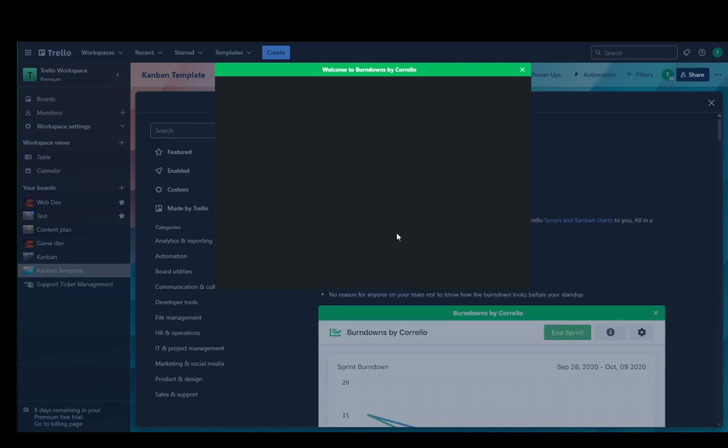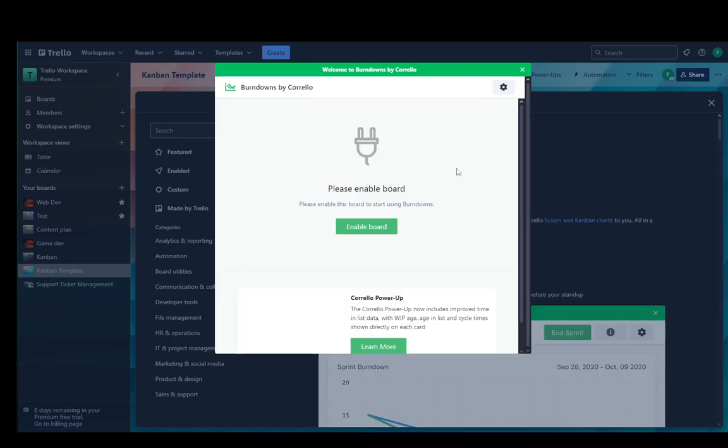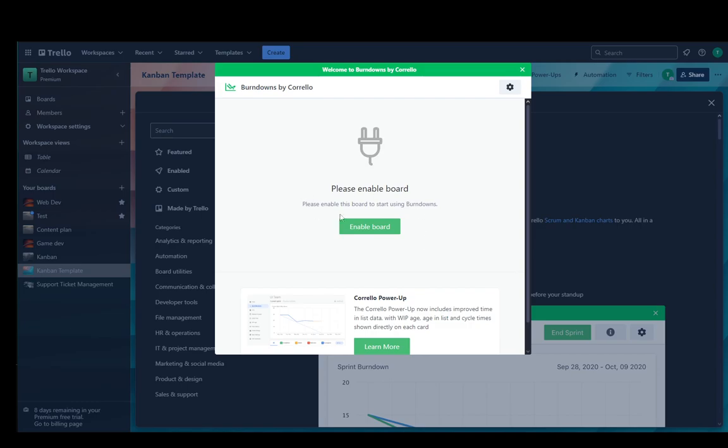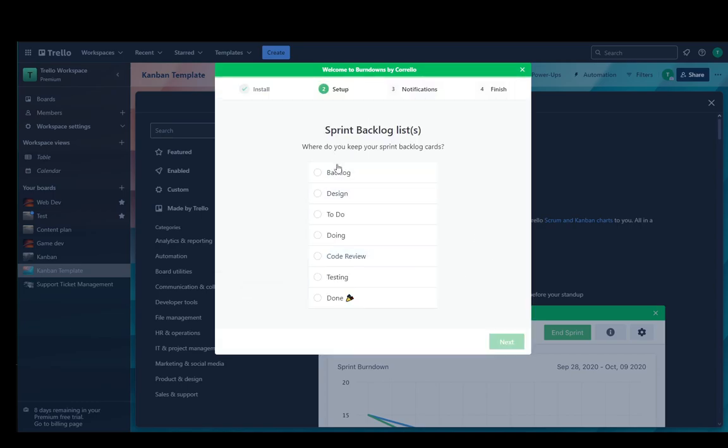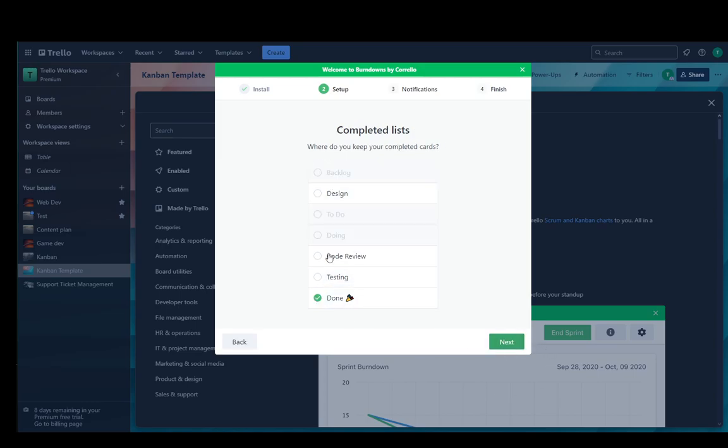Now if you haven't authorized it already, you're going to have to authorize it. I have everything authorized, so I'll just click enable the board and then choose the backlog list. I'll choose Backlog, To Do, and Doing, and I'm going to choose Done as the completed list.